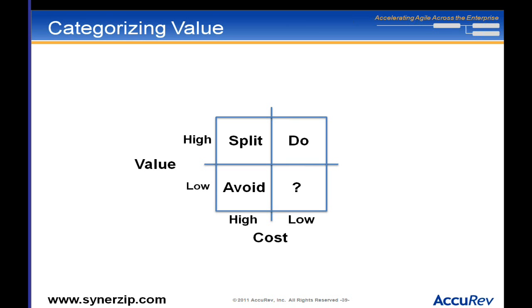The worst case is low value and low cost — that's really hard, one you might want to defer or potentially avoid. If it's high cost and low value, you want to avoid that — it's not clear you'd ever want to do it. Then you've got high value and high cost: don't automatically avoid those, because the thing you think is high cost and high value may actually consist of multiple stories.